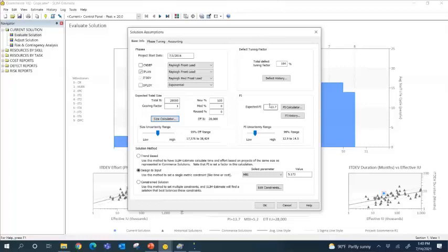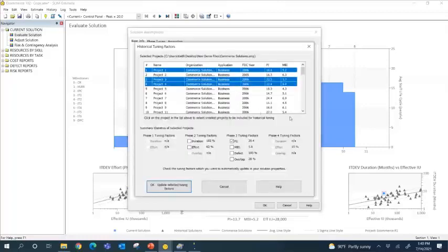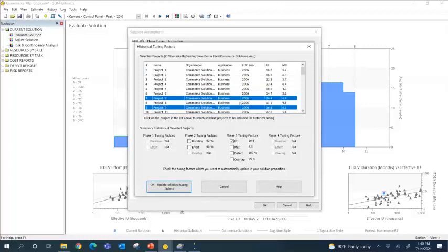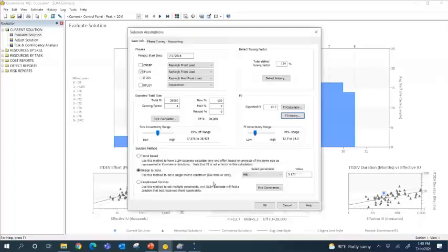Now we're going to put in our productivity index, and it's going to either be based on our own historical data, and we can pick and choose which projects are relevant, right? You can see the PI calculate based on your historical data, based on the work that was delivered, or the functionality and the time and the effort it took on each of those projects. We're recalculating that PI based on this new project, right? Or if we don't have any historical data, we can use the industry database and get the industry average PI. And if we're not sure, we can use a range. We can tell Slim that we're not really sure. We want to tweak our uncertainty range here and use a range for the PI and the size to give ourselves some buffer. Okay, and then we want to make a decision.